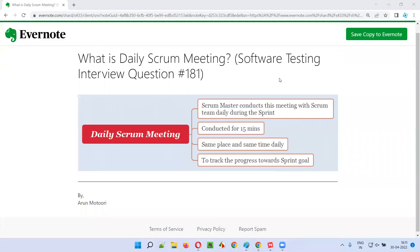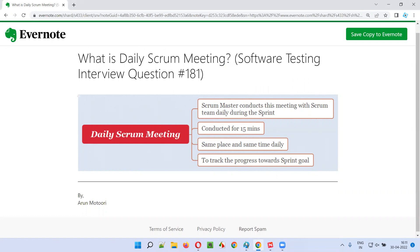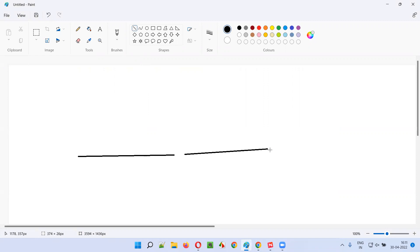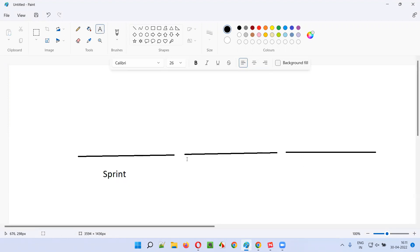Welcome to this session. I'm going to answer software testing interview question 181: what is a daily scrum meeting? In agile scrum methodology, work happens in the form of iterations. Once one iteration is completed, the next iteration begins with a new set of work assigned. Each iteration is known as a sprint.